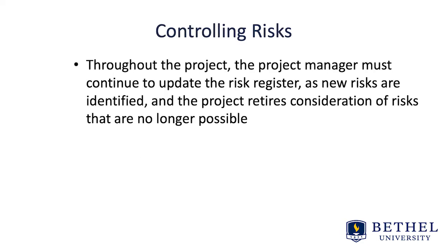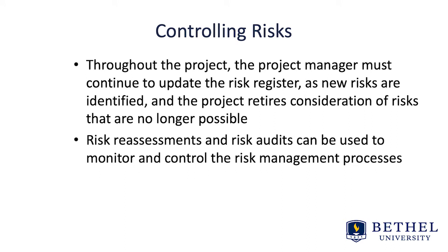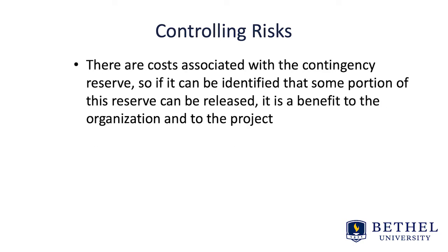Controlling risks. Throughout the project, the project manager must continue to update the risk register as new risks are identified, and the project retires consideration of risks that are no longer possible. The risk reassessments and risk audits can be used to monitor and control the risk management process. There are costs associated with the contingency reserve, so if it can be identified that some portion of this reserve can be released, it is a benefit to the organization and to the project.